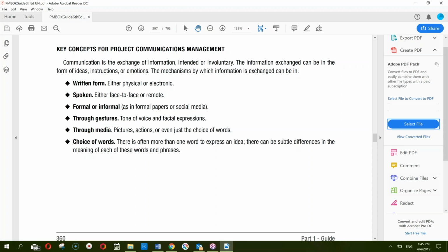That is agreed, but right now I'm just talking about if there are no such restrictions and there are three stakeholders, how many channels will be opened? As if I'm now adding this thing, as if everyone can talk with everyone. Three channels. So as soon as you added a stakeholder, you increased from one channel to three channels. Now add another stakeholder and see how many channels you need. 4 stakeholders. It will be 3 plus 2 plus 1, 6 channels, as I understand.